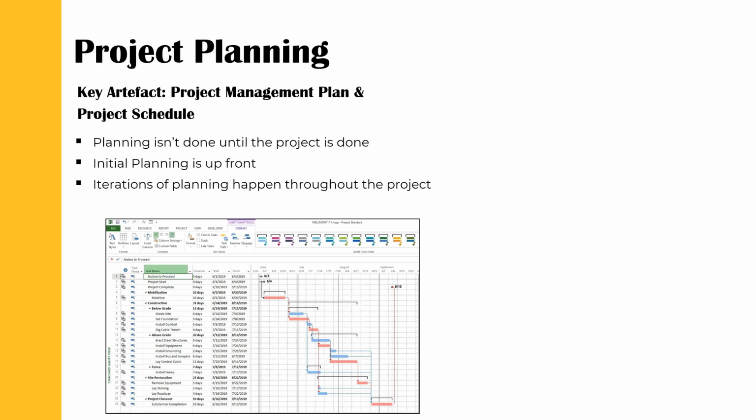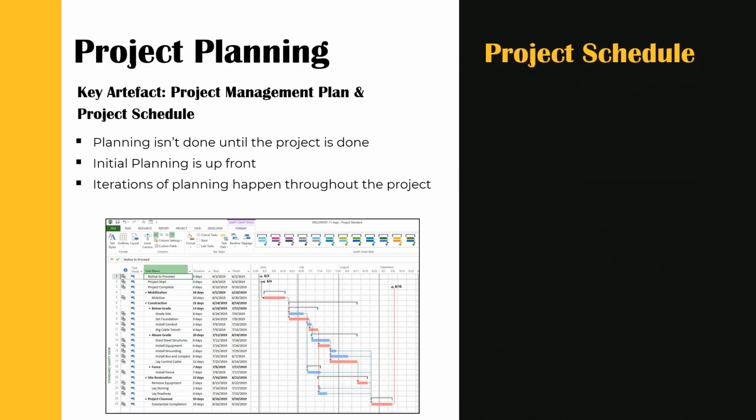As you transition from the discovery phase through to the definition phase of the project, you should have gathered enough information through requirement gathering and planning workshops to develop a high-level plan. That becomes a detailed plan. Project schedule. Your schedule will consist of a number of activities. An effective way to pull together a plan is to group activities into categories. This is called a work breakdown structure.